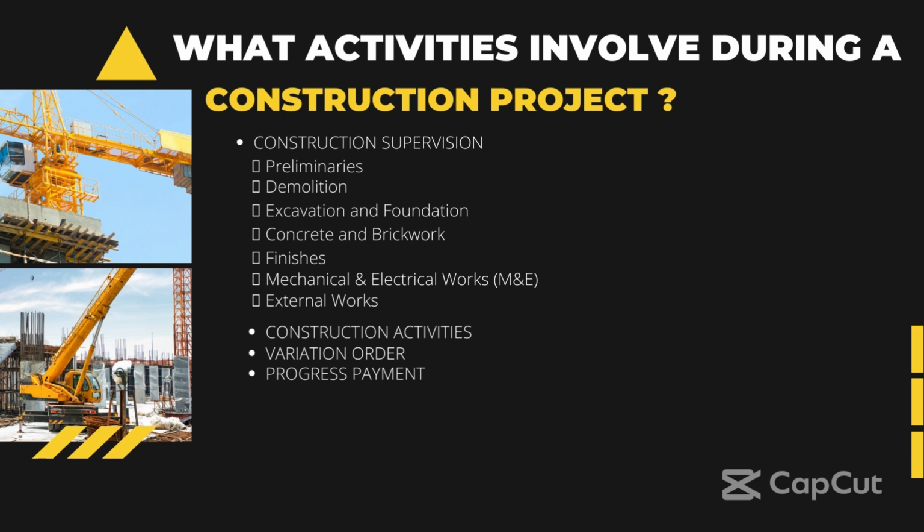Progress payments help companies recover a portion of their costs along a project's way, thereby maintaining a steady cash flow. They also protect companies in the case of client non-payment. A firm may decide to stop working on a project until issues are resolved and payment is received. On the other side of the equation, progress payment gives clients a chance to assess whether the billed portion of work has been done to their satisfaction before the project proceeds. This incremental approval approach may head off problems.